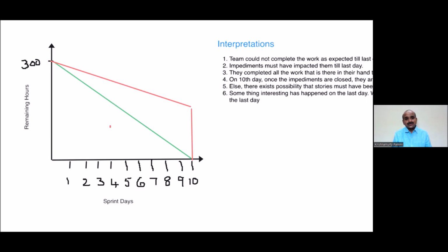It may so happen that you may be waiting on certain reviews, and you expect that unless a review is done, you can't close this task, because the review may give you more review observations. So you may think that the remaining hours are more and you can't reduce them till the review is done, right?